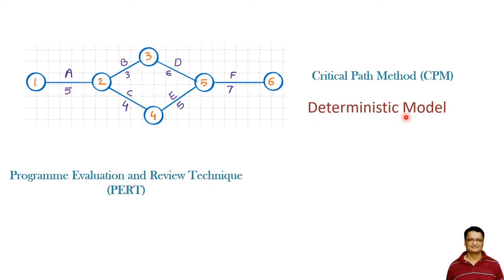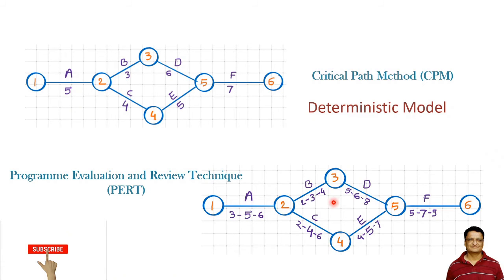Whereas in PERT, for the same activities, we consider three different time estimations. The three represents the optimistic time estimation, meaning if everything goes right and conditions are favorable, the activity will be completed in three days. If everything is normal, it will be completed in five days.